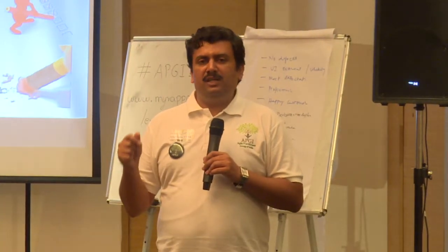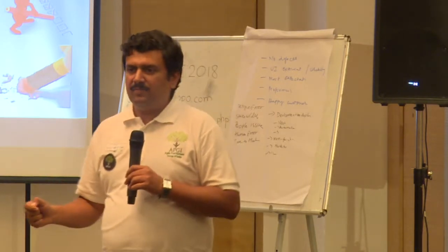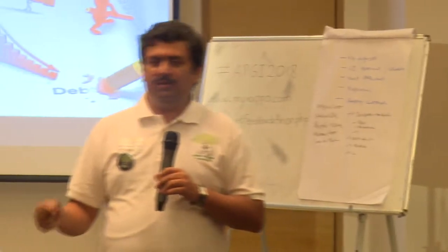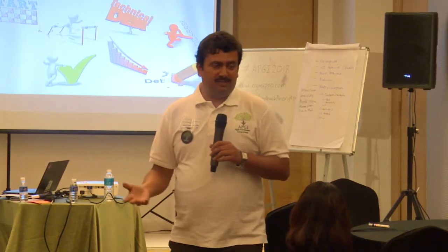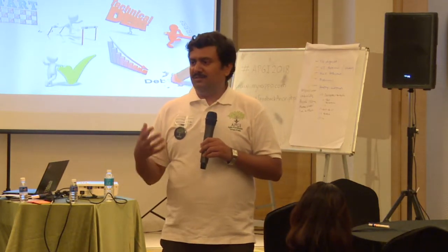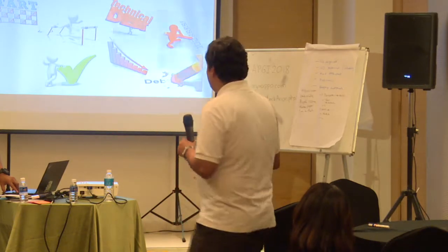And we made it so stringent that if a team wants an exception in DoD, it goes up to director and VP level. So imagine the kind of discussion you need to have at that level about why you cannot meet the definition of done for a particular feature. You need solid reasons and rationale, or let's buy that time to get it done. And it started doing the magic for us.